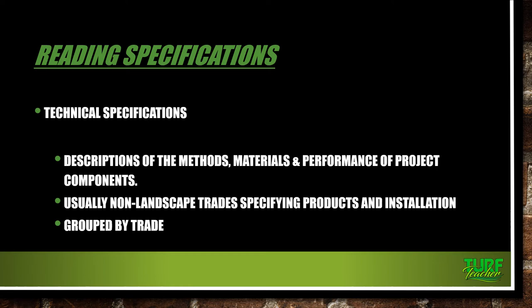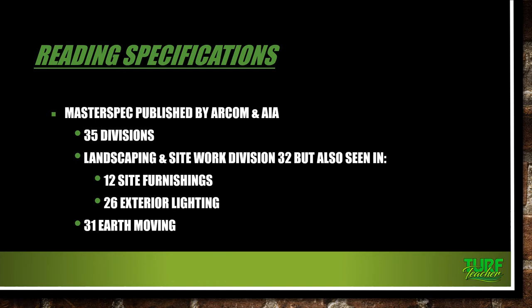Trying to think if there's anything else about the text. The master spec is published by ARCOM or the American Institute of Architects. It's kind of a generalized format that is tailored to each project. There are 35 divisions. Landscaping and site work is division 32, but also seen in division 12, site furnishings, and 26, exterior lighting. Hey, the landscape contractor is to install uplights on the trees coming in the entrance drive. So you've got to check each and every one of those. And then as well as division 31, earth moving. But just remember that there are 35 divisions in the ARCOM and AIA